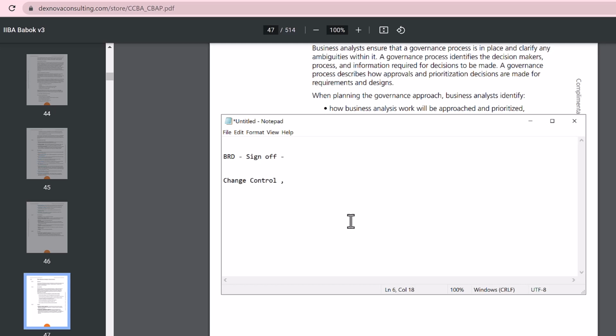So you have to tell the business owner beforehand, before we get the sign off, I understand you can modify the requirements and all that, but once the requirements are finalized, once it is documented, once they provide the sign off, or if we are in the middle of the development, then if you want to change anything, it has to go through this change control process only.